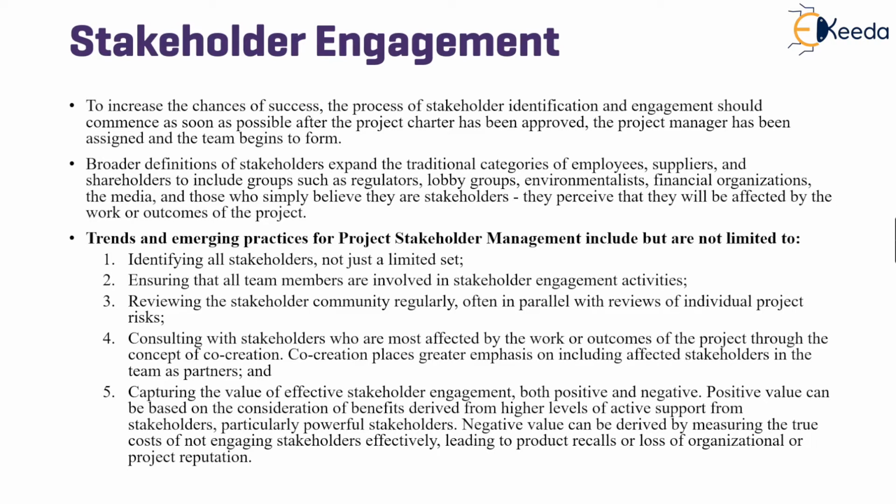Positive value can be based on the consideration of benefits derived from higher levels of active support from these stakeholders, whereas negative value is derived by measuring the true cost of not engaging these stakeholders effectively. This will lead to losses for the organization, or the project's reputation is at stake.